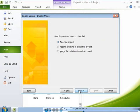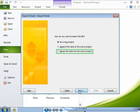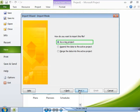Next, you need to specify how you want to import the data. You can import the data to the active project, merge the data with the active project, or import the data as a new project file. You want to create a new project, so select the as a new project option.